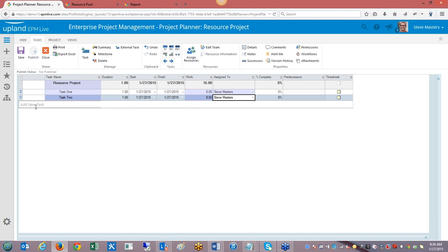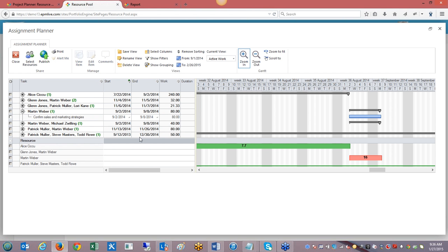But basically, you come in, you build the project schedule, save, publish, and then that's going to kick off the workflow of those tasks. And now when I go back to my resource management tool, I'll see those particular tasks in here, and I'll be able to start looking at, okay, well, we plan this person to work full-time for the next 3 months on this project. What's actually happening? Does he have other service requests that are affecting him, or is he a developer and he has backlog items on one of our applications or products or whatever it might be?